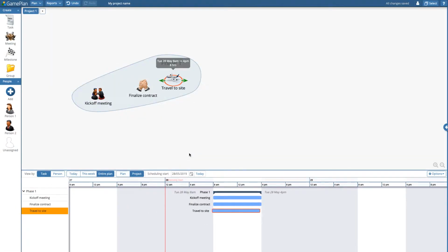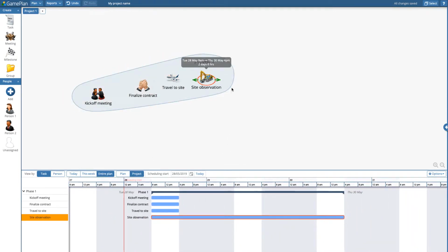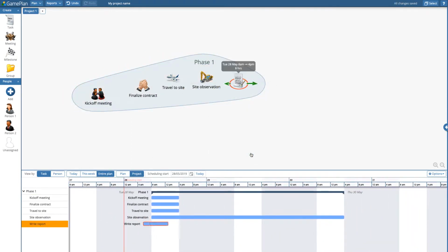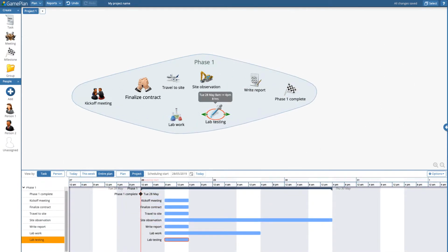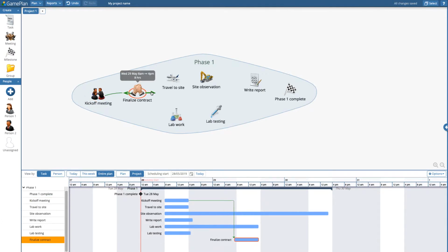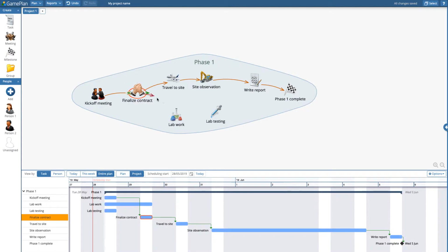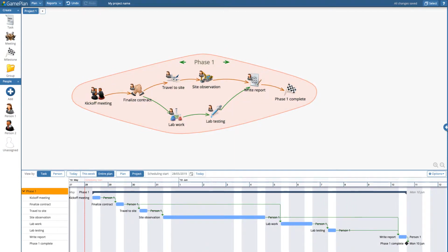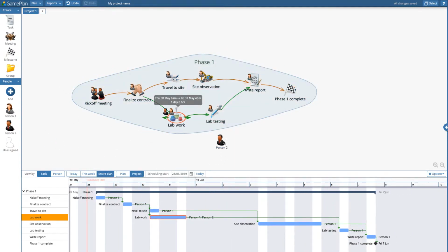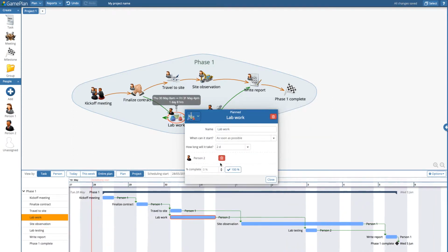You plan your projects by simply drawing your project workflow on our virtual whiteboard, and GamePlan's powerful scheduling engine does the rest. Make a change on the whiteboard, and our scheduler automatically updates the project schedule and displays it in a Gantt chart. The GamePlan Gantt chart shows your entire project timeline, including when all deliverables will be met and when the project will complete. The schedule is resource leveled, which means that no one is ever double booked, and the schedule is achievable, so you can publish your deliverable dates with confidence.